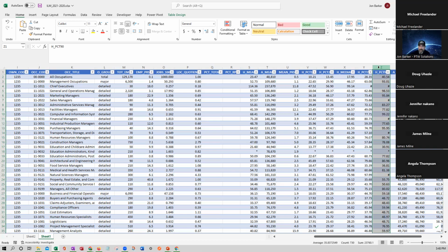Okay, good. Right? If I don't have that, then I have to go down to the thing that's a little bit more risky from that cost realism vantage point. Okay, well, I have these contingent offers. I have a contingent offer of this person at this rate under this solicitation. Okay, great. If I don't have that, then I go and find the data that I need that substantiates the prices that I need.